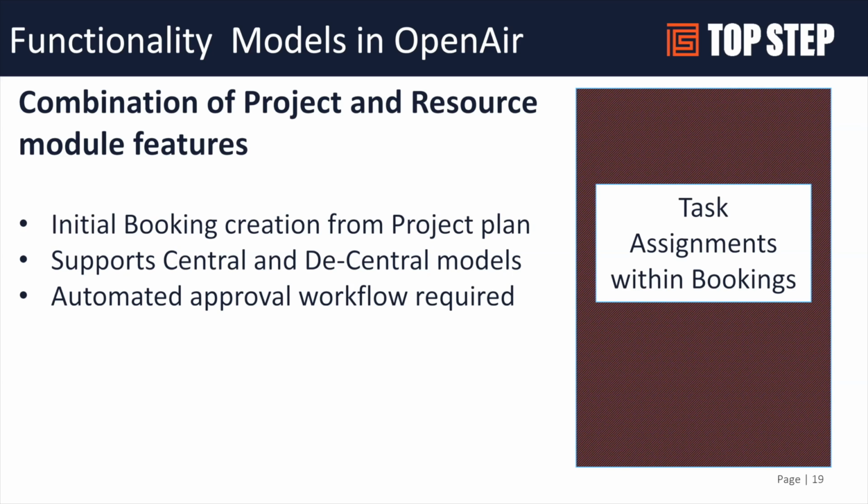It does require the approval process we talked about earlier, the booking approvals. A lot of customers like that approach where they set their project plan up, and then use that to auto create the initial set of bookings, which would then get submitted to the centralized resource team. And then they would go to start taking action and assigning resources.